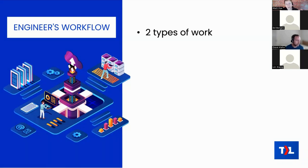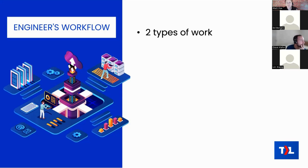We only put work in the calendar if it needs to be coordinated between two or more people, or it's justified by the nature of the work. Otherwise it goes in the queue, which you see in top left. Those are the two types of work. Engineers find scheduled work in their calendar — and it should also appear in the scheduled column in top left. For queued work, they find that in top left in the ready status.